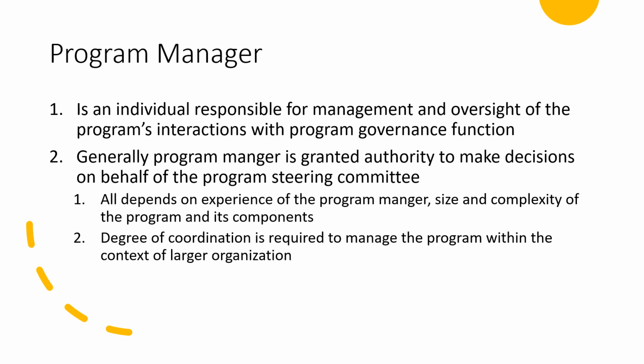So generally the program manager can be granted authority to make decisions on behalf of the program steering committee, but the grant of authority depends on the experience of the program manager, the size and complexity of the program and its components, and the degree of coordination required to manage the program within the context of the larger organization, right? So that's how authority can be granted.